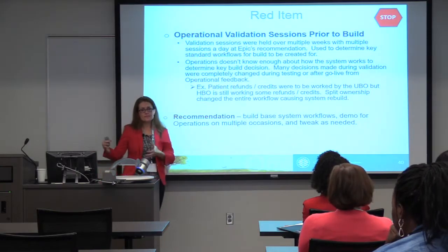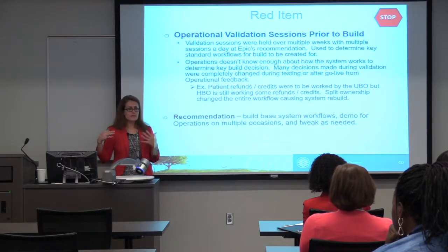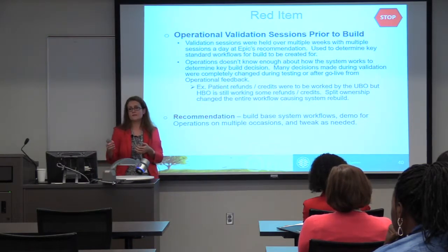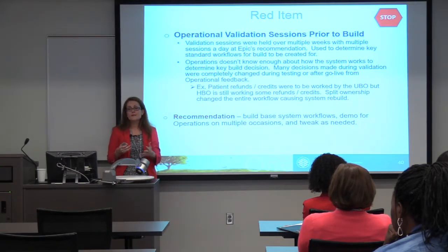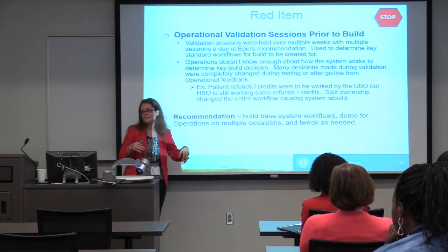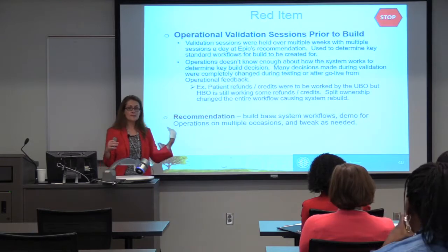And so I've got an example of patient refunds and credits. We have a unified business office where now, all the billing questions and statements and everything comes from one business office, and they were to work the credits and refunds, and that's what was decided 2 years ago. But they changed their minds on that, and now HBO wants to do some piece of it, and so we had to completely rebuild some of the workflows to accommodate that.